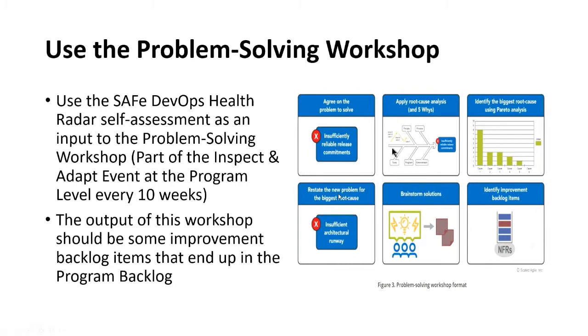Then what we do is we run it through an Ishikawa diagram exercise, also known as the fishbone, and that's what we have here in the second box. So this is people, process, tools, program, and environment. Environment means culture. And so we ask, from the perspective of this problem and the perspective of each bone in the fishbone, why did this happen? We ask it five times.